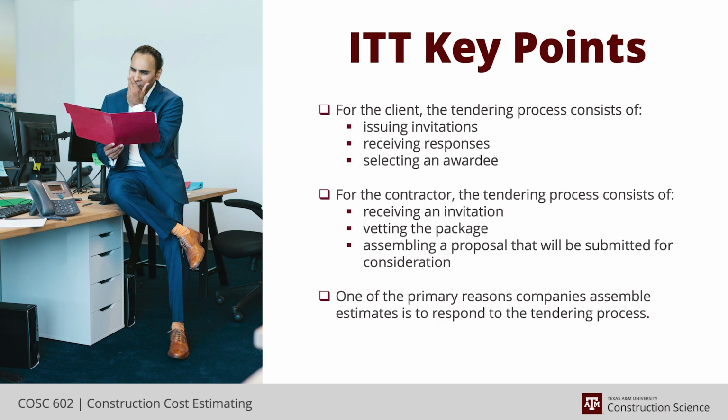But as they move through each one of those phases and break through the gates to the next FEL stage, the associated estimate, as we've talked about before, becomes more and more detailed, and the accuracy requirement is increasing. So the package they're sending out has to increase.